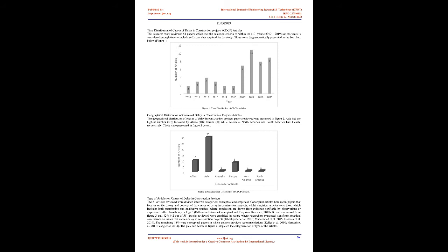Kim et al., 2016. A survey of delay factor analysis for hospital projects in Vietnam. The paper indicated that the top 5 causes of delay in hospital projects were owners' financial difficulties, change of design, incompetent contractor, inadequate experience of contractor, and improper handling of responsibilities by supervisors.